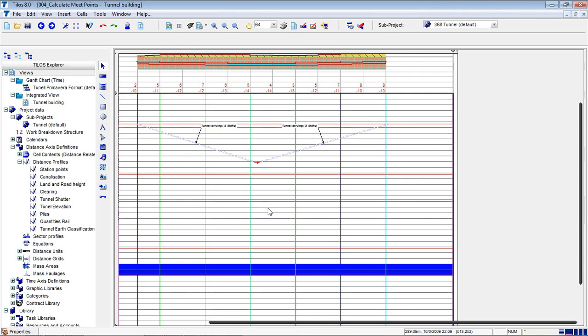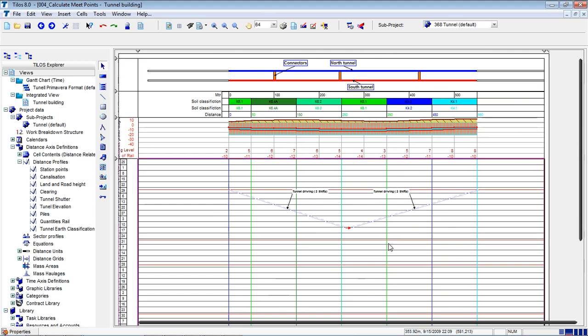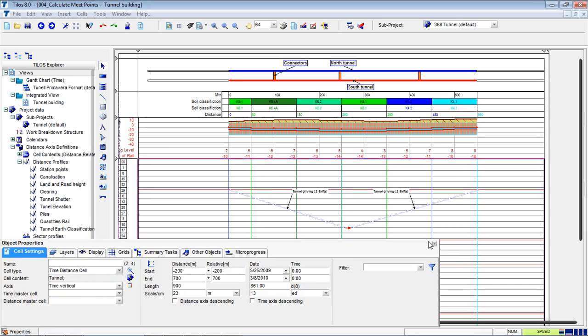Let's say that our project has started. I planned this way without soil analysis, but somehow I receive from the site people a soil analysis. What do I need to do? First of all, I was mentioning that TILOS is very useful. You don't have to change the plan. I am just going and changing the calculation of the activity from not considering soil to considering soil. This will also answer your former question. Let's do it like that.